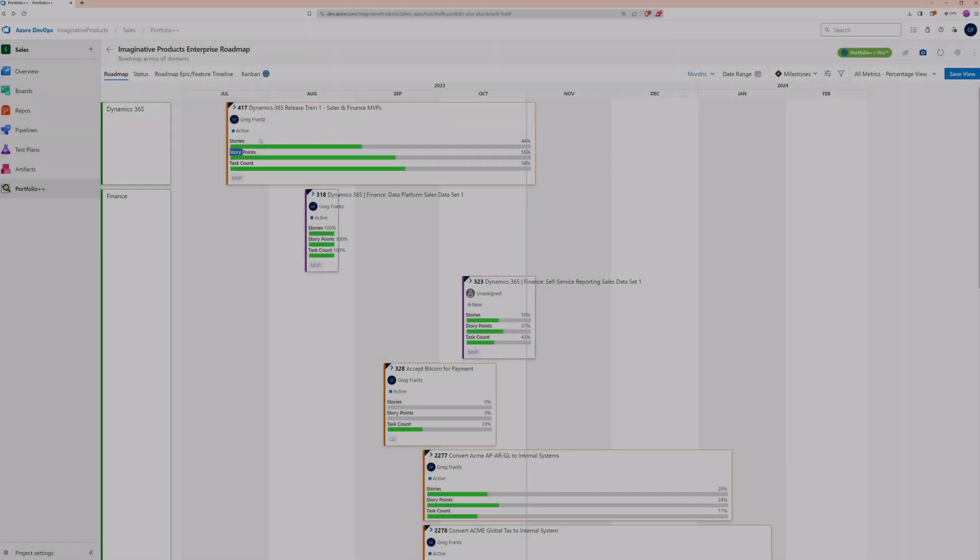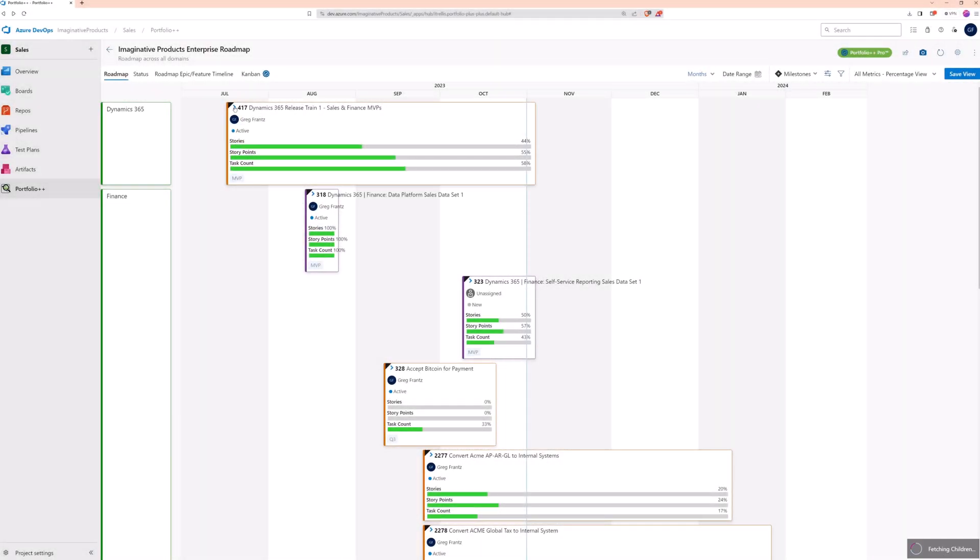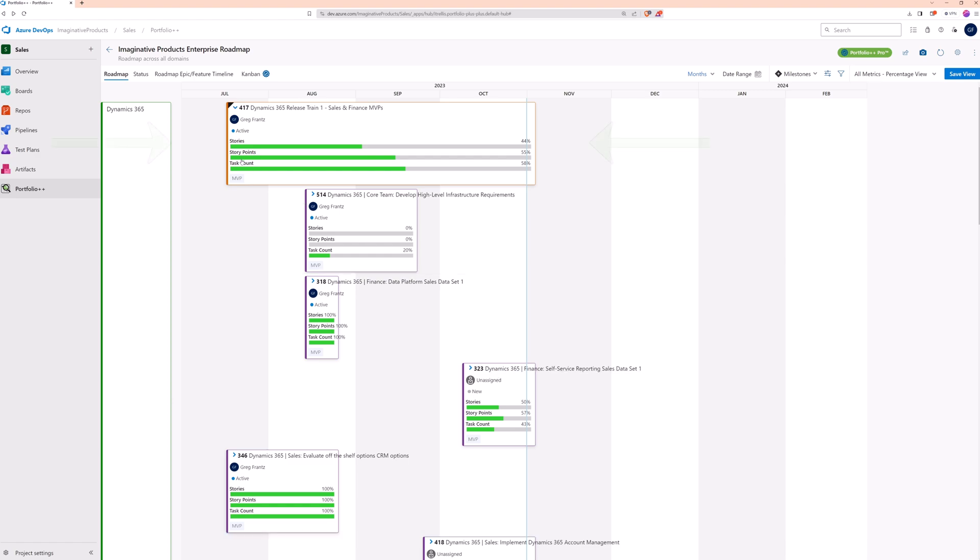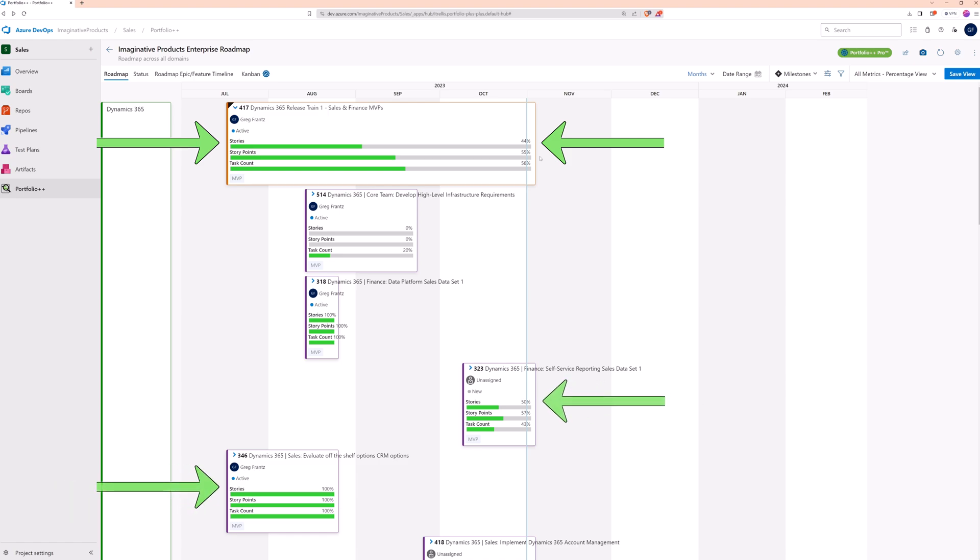The duration of any card on the roadmap is determined by the first and last iterations of its underlying work items, as seen in this example.